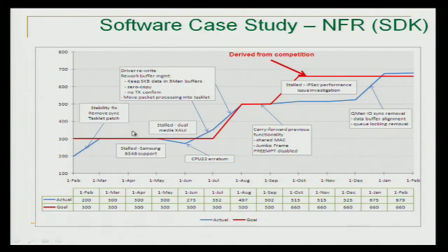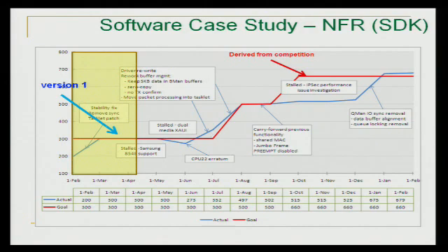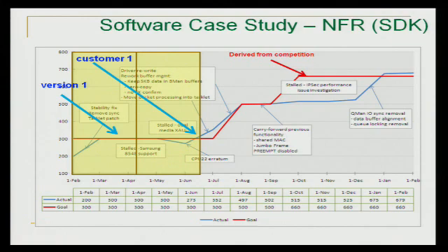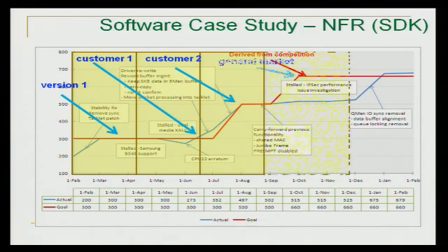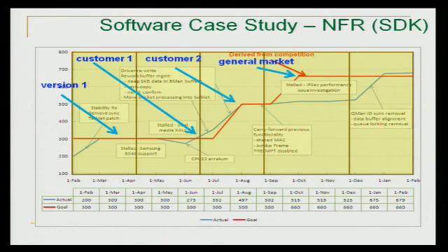I like to annotate my crawl charts so that at every point, I know exactly what I did to get that certain capability. Now, this was done as an agile project, so I was able to make multiple software releases. The first version was more of an internal release. The second one went to the customer, and we were able to meet their initial performance goal. In a third release, they expected higher performance. The next release, higher still. And then we did some quality and hardening in the last increment.